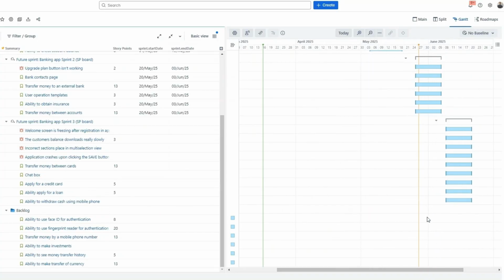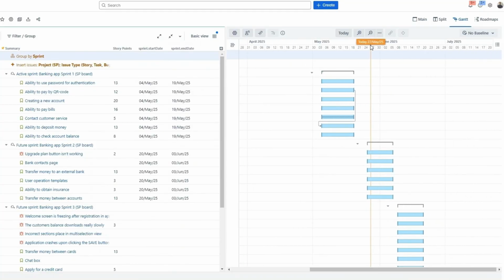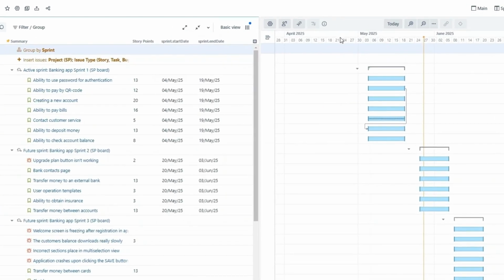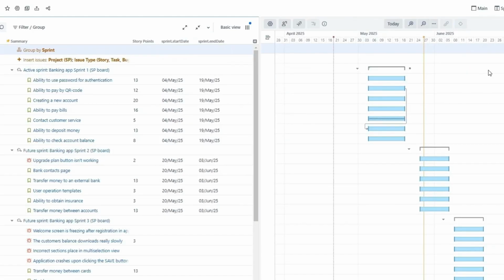We can also visualize timeline markers. These represent various time boundaries. By default, Gantt shows today's date and the project's start date markers. On top of that, we can add some custom ones. The markers can be based on fixed version dates, which works well with sprint planning. Add markers by simply placing them on a specific timeline date to indicate a certain version's release date, or just to be used as planning boundaries.